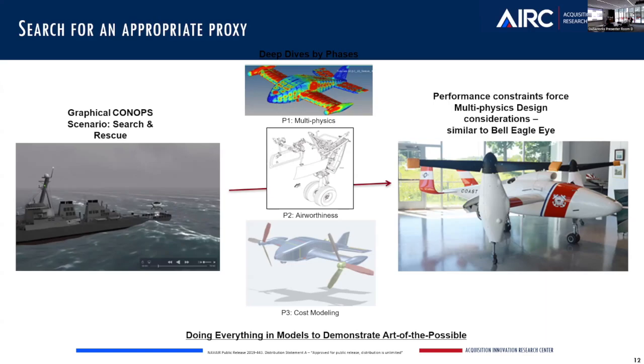And so what that enabled them after that analysis was to feed back into the ecosystem and say, hey, we can't actually meet this requirement. We need to present this to a decision maker who can say, you tell us what to do. Do you want this landing rate and this landing gear, or do you want this other landing rate with this less expensive landing gear? And how this actually worked was there are several models.